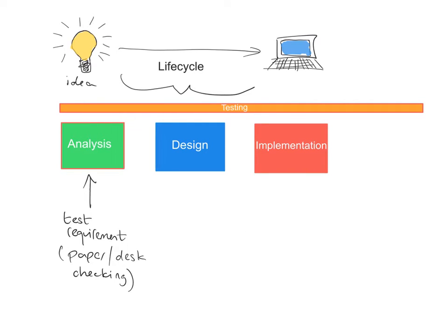Okay, let's try and drill down into some actual process now that you could adopt as well. So as regards testing at this analysis phase, a good thing to do is you simply test the requirements. Now what exactly that does mean, and what would be a good process for that. So you go away, you may speak to potential users, and you may do some introspection, and then you gather requirements, and then you write requirement statements is often the process that you adopt here.